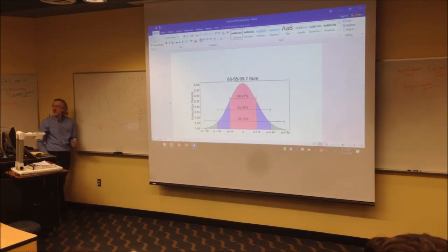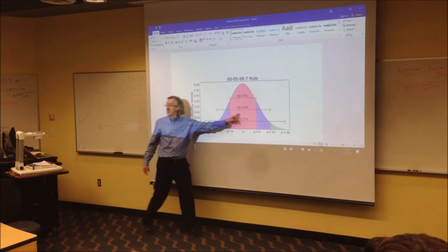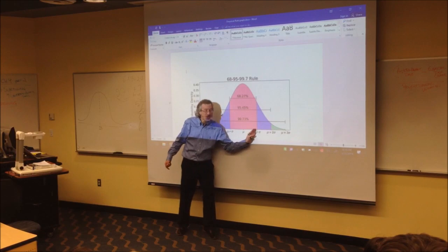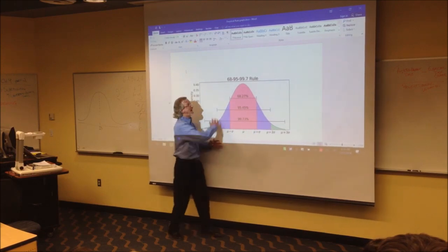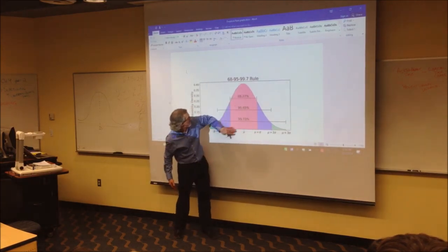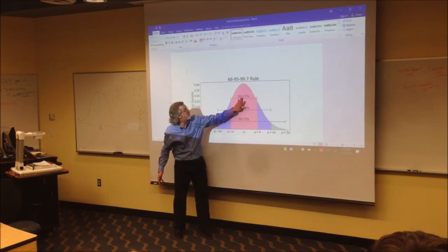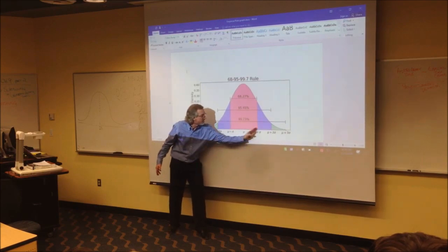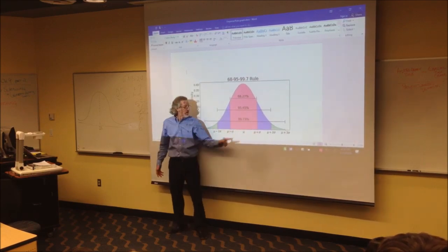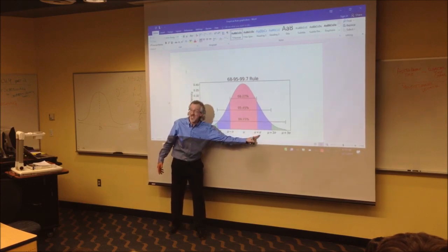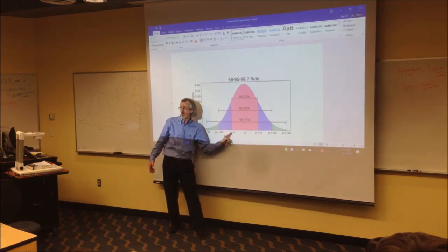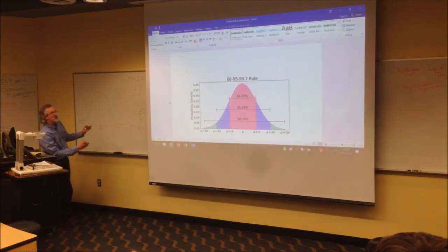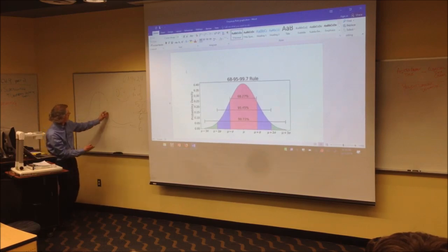But how do you know where to put the numbers? This is what I've always used to decide where the numbers go. Most distributions follow this empirical rule, that 68% of all the possibilities are between this area. So this area represents 1 standard deviation above, 1 standard deviation below. Once we know the standard deviation of the project, I want to put my dashes right where the 68% outer is.